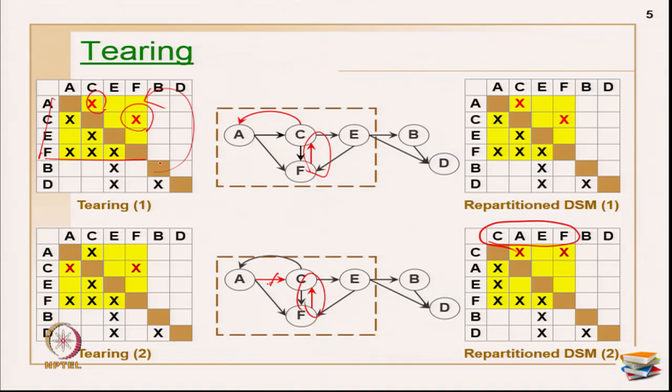Okay. So then you are actually getting out the sequence within the block. As a result, from the partitioning and tearing process, you actually got the sequence of the entire project execution. You got the data formation, partitioning, and the overall sequence of the whole project along with block identification. Through tearing, you are finding out the sequence within the block.